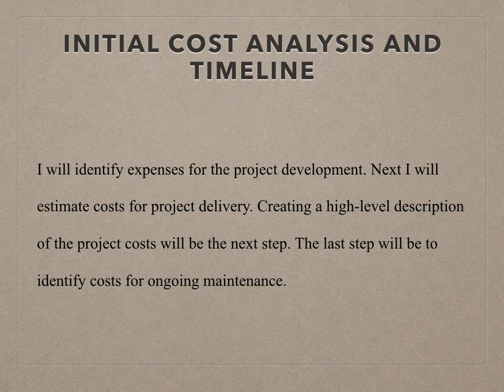Initial cost analysis and timeline. I will identify expenses for the project development. Next, I will estimate costs for project delivery. Creating a high-level description of the project costs will be the next step. The last step will be to identify costs for ongoing maintenance.